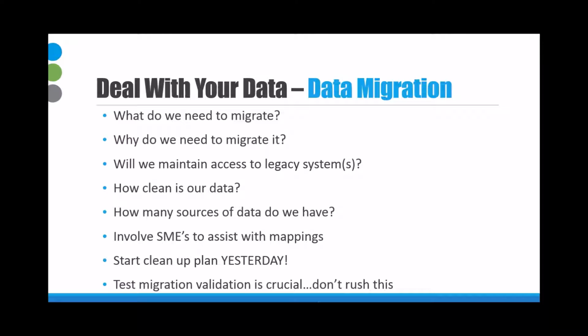And then really an action item here is, if you're going to be working on a CRM implementation project coming up, you can start right now with the cleanup of your data. A lot of times, companies are aware of where the data needs some TLC, but it's a task that can take a lot of time. So you don't want to underestimate the time there. You want to get started on that right away.